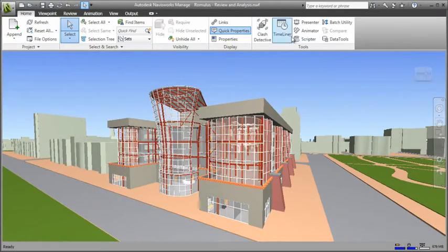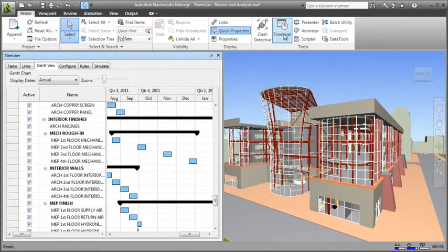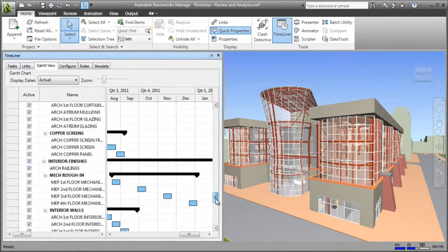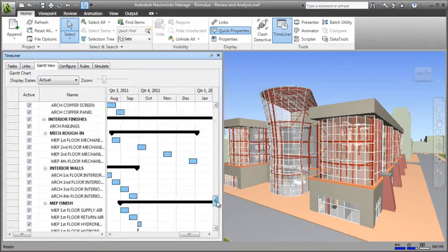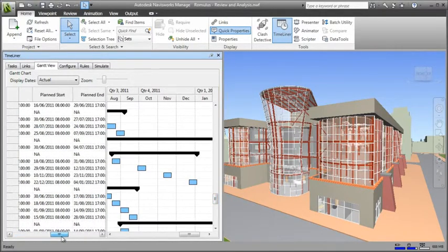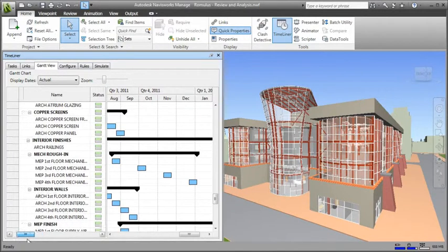As mentioned earlier, integrating design and construction models with construction schedules from third-party planning applications enables project stakeholders to visualize and validate their plans, and also simulate alternatives to prepare for what-if scenarios and identify optimum schedules.